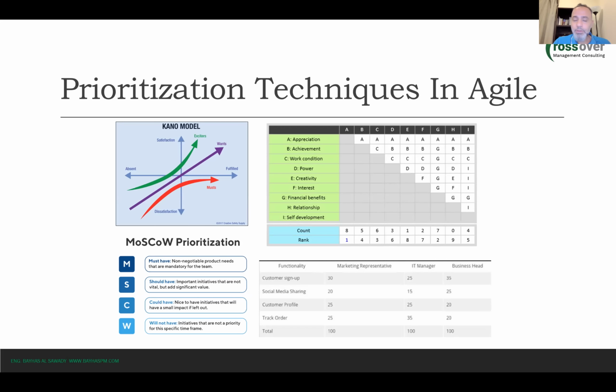So we started with the very basic thing, which is again, the plan. So we developed a scope management plan that indicates the who's and how's of scope. So who's gonna develop the scope and how we will develop the scope and who will be responsible for tracking, validating, and so on, whatever concerns the scope.